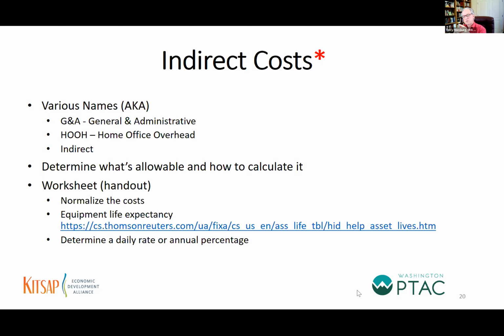Now, the other part of your scenario is competing for another contract in the future. Now you own the vehicles. Yes, you would want to use the Army Corps of Engineers manual, look up the type of equipment or vehicle and use the pricing that's in that manual in your proposal to compete for the subcontract. That's how it works. Great, thank you. Okay, great question. Any other questions on direct costs, labor, materials, or equipment?